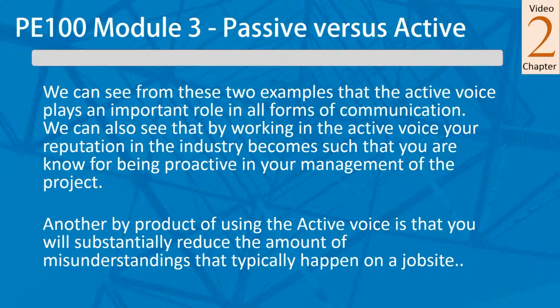So you got to get to the manufacturer that's supporting that vendor and have him put something actively correct or actively telling you what's going to happen, so that you have it in your file that the manufacturer is supposed to be doing a certain thing. You're not taking it secondhand from your vendor. So these are just important things as you get more and more used to dealing with active versus passive, that will become more natural for you.